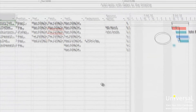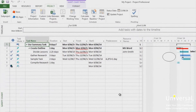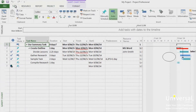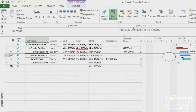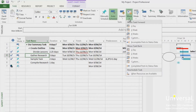You can also move a task to reschedule all or part of it. This tool is found under the Task tab. You can select a task and click on the Move drop-down box. As you can see, you can move the task forward or back, and you can create a custom move to shift it forward or back by as much time as you need.